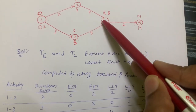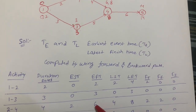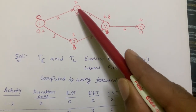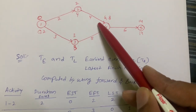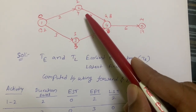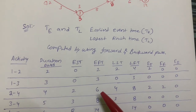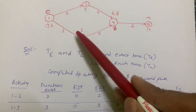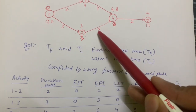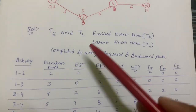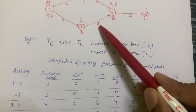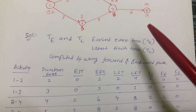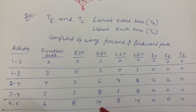For activity 2-to-4, before completing it we must complete activity 1-to-2, which is the preceding activity. So we add 2 + 4 = 6 days. For activity 3-to-4, we add 3 + 5 = 8 days. For activity 4-to-5, we add 3 + 5 + 6: that is 8 + 6 = 14 days. So the earliest finish time for 4-to-5 is 14.